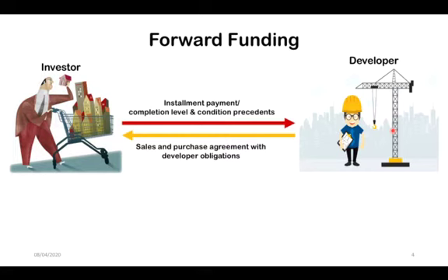The last installment of payment for the project will generally be paid after the usual purchase price maturity requirements. Such requirements may include 1, registration of the conveyance, that is the transfer of title from the developer to the investor, and this will be met, and the main tenant, for example, has also taken over the lease object, which is their unit, and preferably has also paid the first rent.